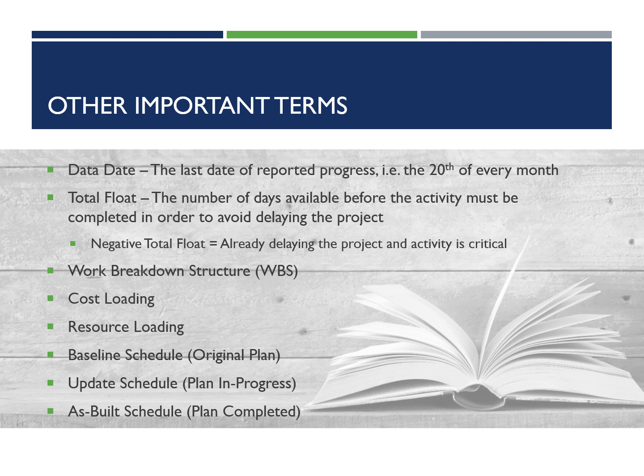Work breakdown structure, or WBS. A work breakdown structure is just a handy way of breaking the project into smaller chunks so it's a little easier to navigate the schedule. Typically, when building a schedule, I start with the work breakdown structure first and break the job up into smaller chunks. Then, from there, I build activities inside each individual work breakdown structure. It's just a little tool that's inside most of the software programs, and you might hear about it on the job site.